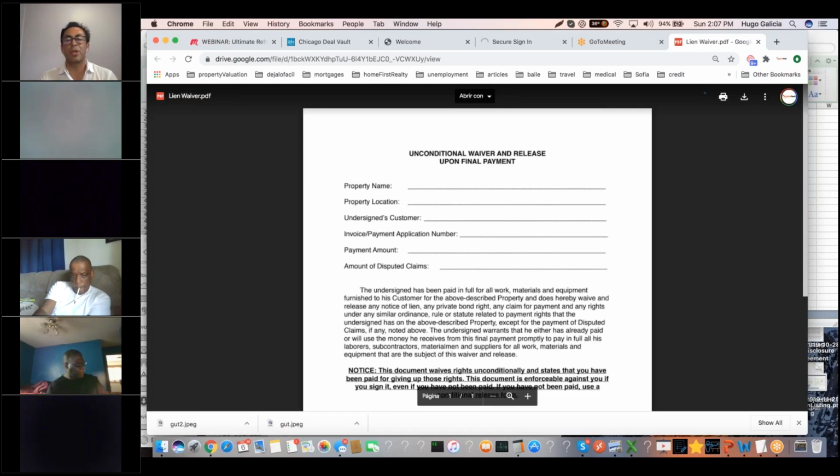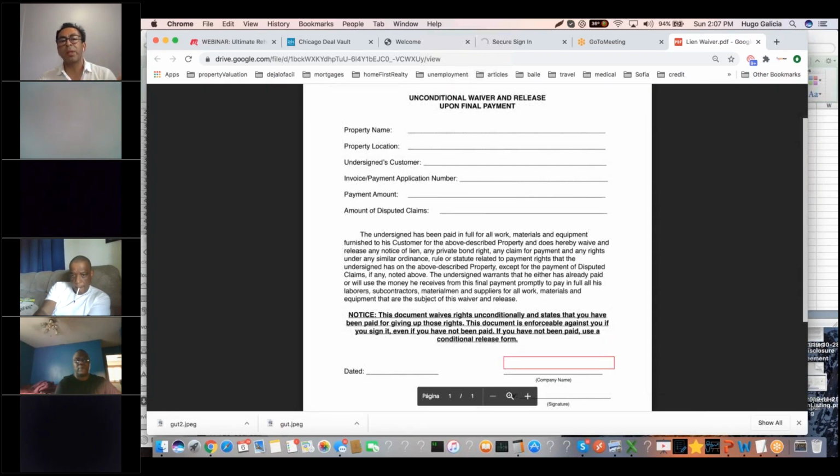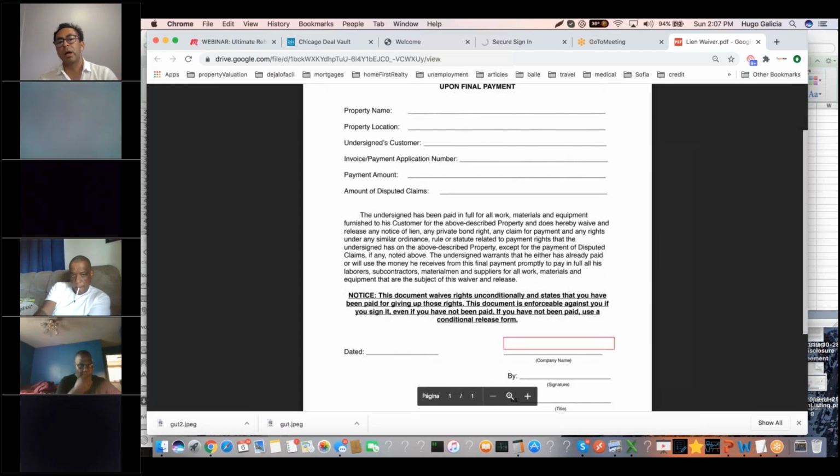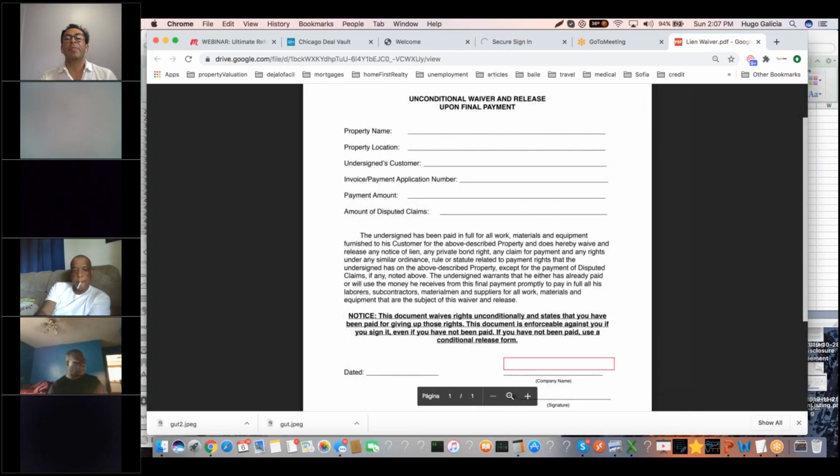This is just critical. Once they complete the work, they need to put in all their contact information. They need to put in how much you paid them, and this guarantees that in the future they cannot come back and say, "Oh, by the way, you owe me 2,000 extra, and since you didn't pay me, I'm going to put a lien on your property." This guarantees that you settle: they did the work, you paid them, and you went your way, they went their way.